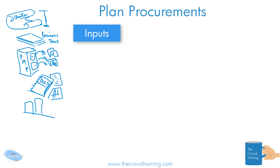Our culture is extremely relevant in how we go about doing this. Are we a startup company where we could just go buy whatever we need, or must we go through a very formalized methodology to get anything purchased and go through certain groups and departments? Those are enterprise environmental factors. And there could also be templates and other materials useful for us — our organizational process assets, maybe as a checklist to get us through the various things that are part of our procurement.